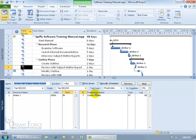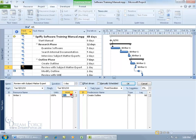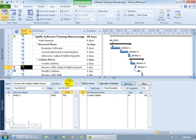Let's undo that and try fixed duration, where the duration will always stay at one day. Even if I update the work to 16 hours and click OK, nothing changes — it still shows him working 16 hours in one day. If I type in 32 hours and click OK, it won't push that out because the duration of the task has been fixed. Let's undo and go back to 8 hours for one day.